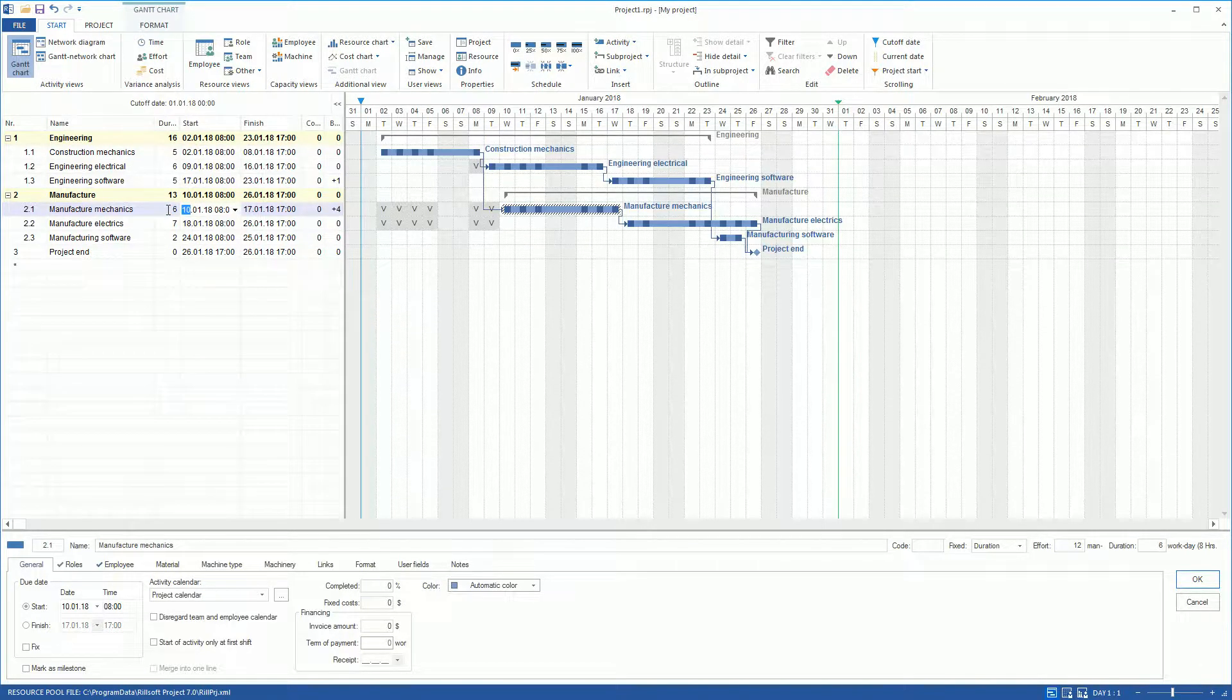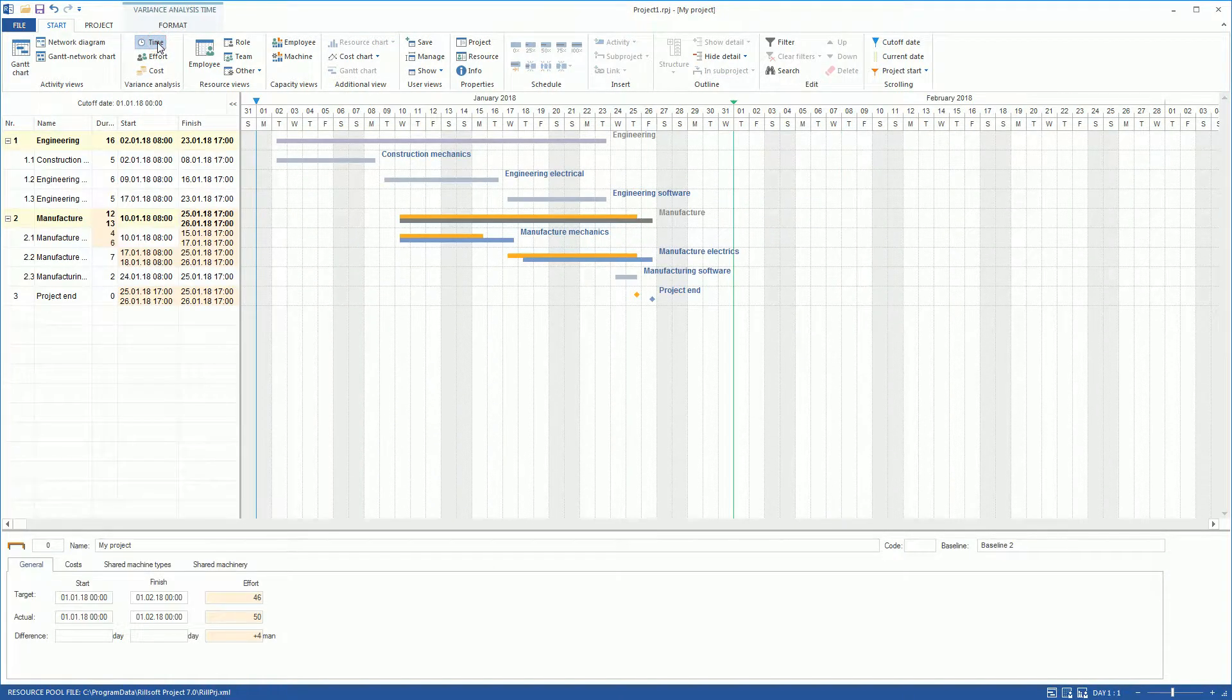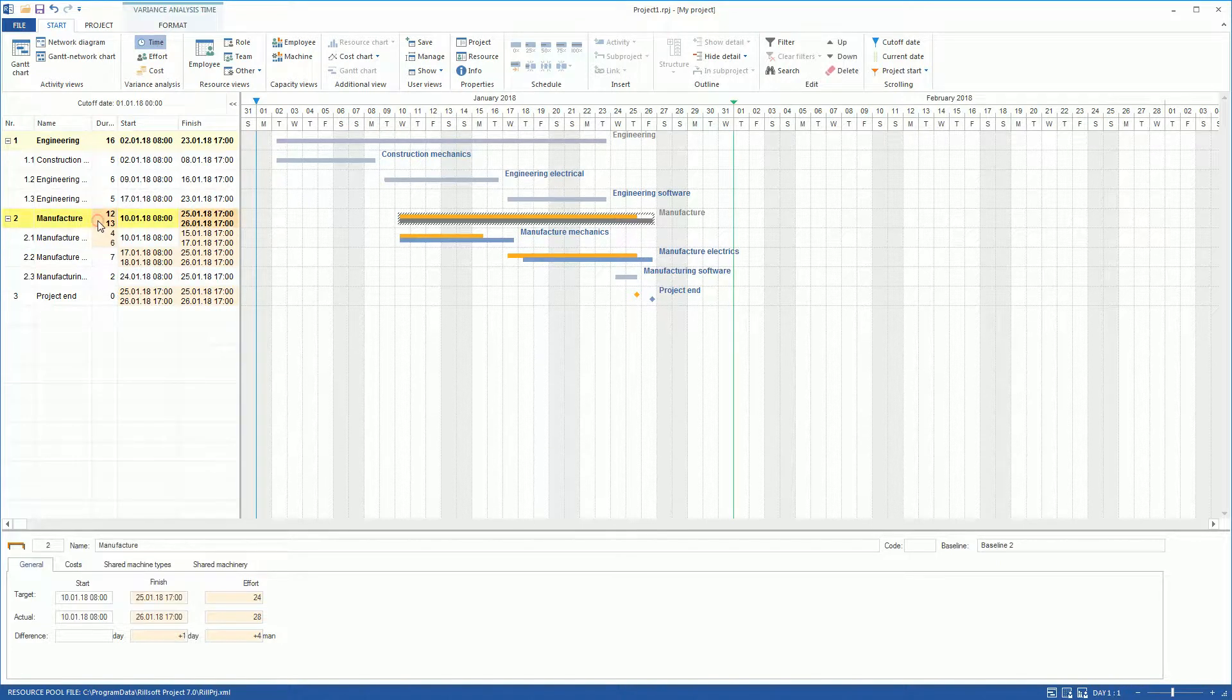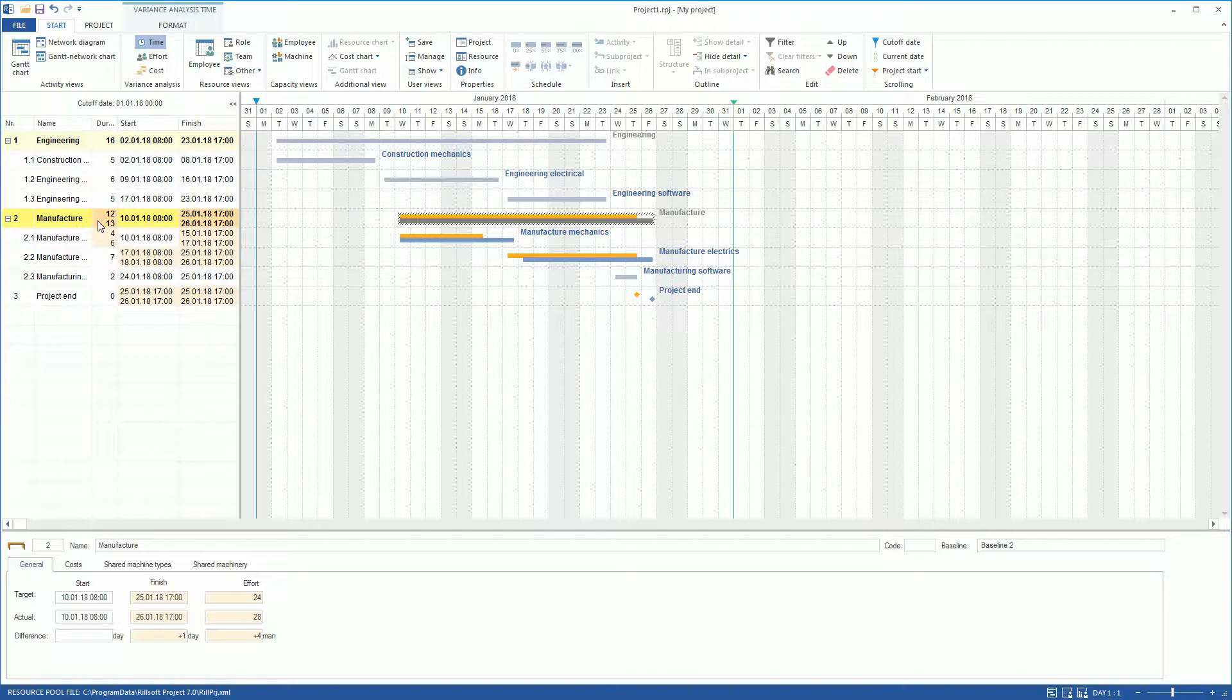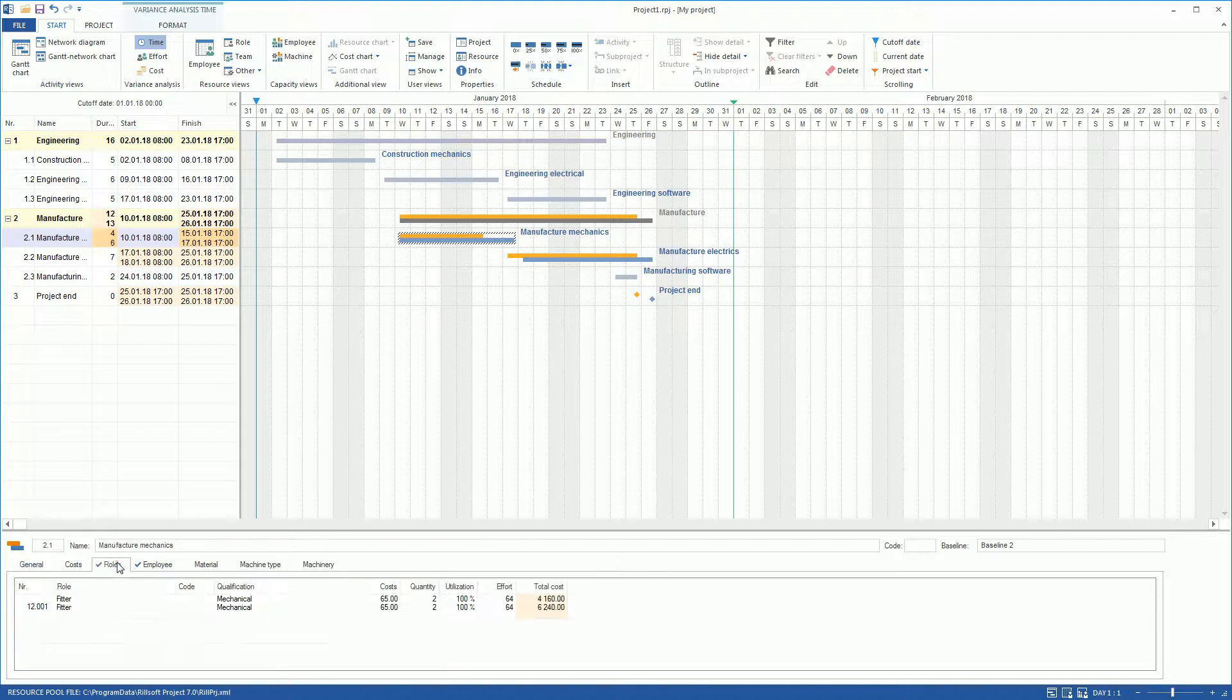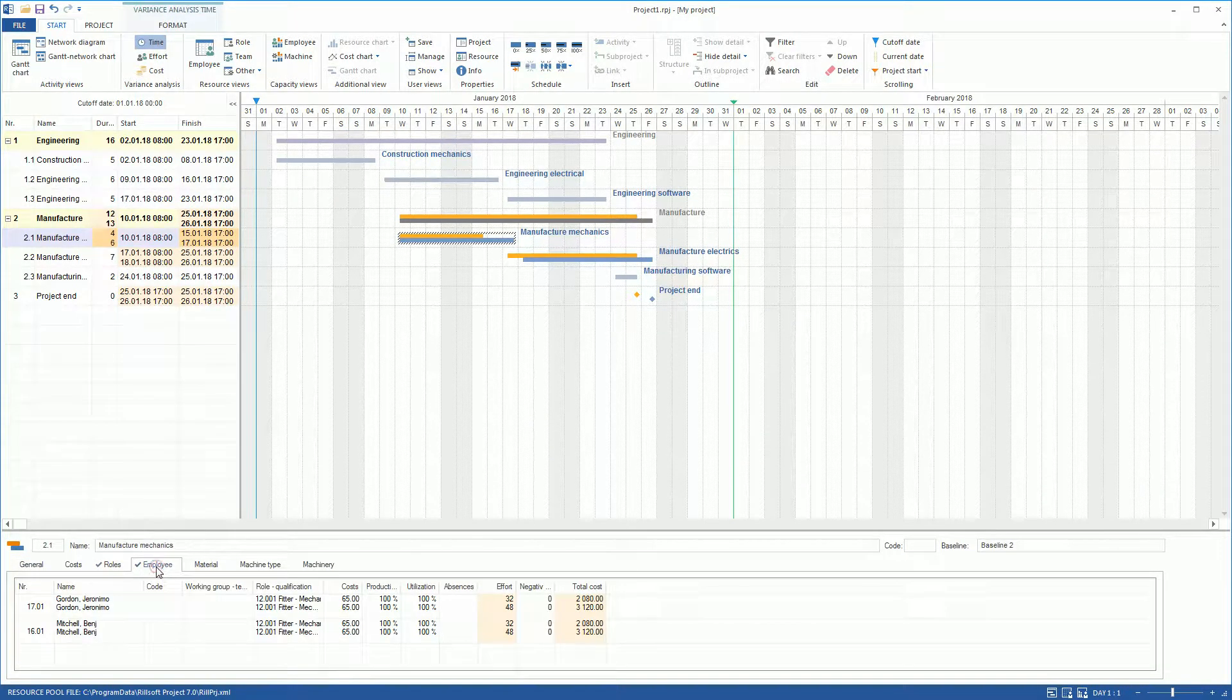At the Variance Analysis view Time, we can see that the extension of the Manufacture Mechanics activity has caused a postponement of the successor activities. We click on the line of the Manufacture Assembly activity and compare the resulting differences in the properties window, which can be identified by the checkmark in front of a tab name.